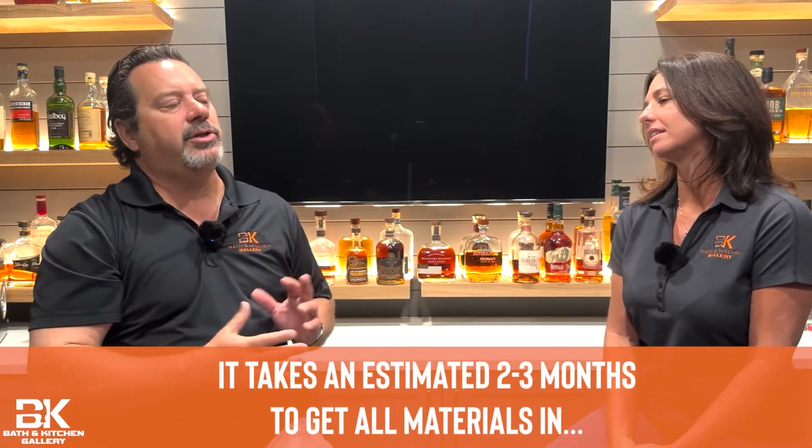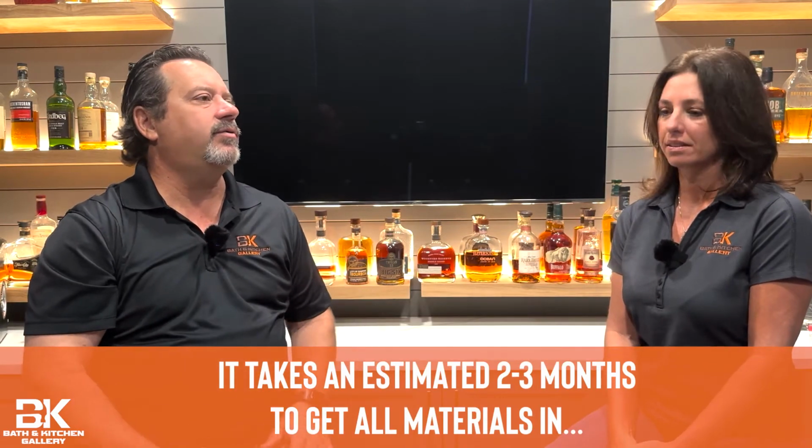Were you kind of anxious before the job started with your contractor? A little nervous or anxious? I was anxious. What was the timeline from when we signed the contract to where we get the products in? Typically that's between 2 and 3 months. That's where you would be anxious and waiting. Yes. 2 months is a good average, but materials have been hard to get recently. It's getting better right now, but we've been as many as 6 months out waiting for materials. But generally speaking, 2 to 3 months is the range of when we're setting that up.